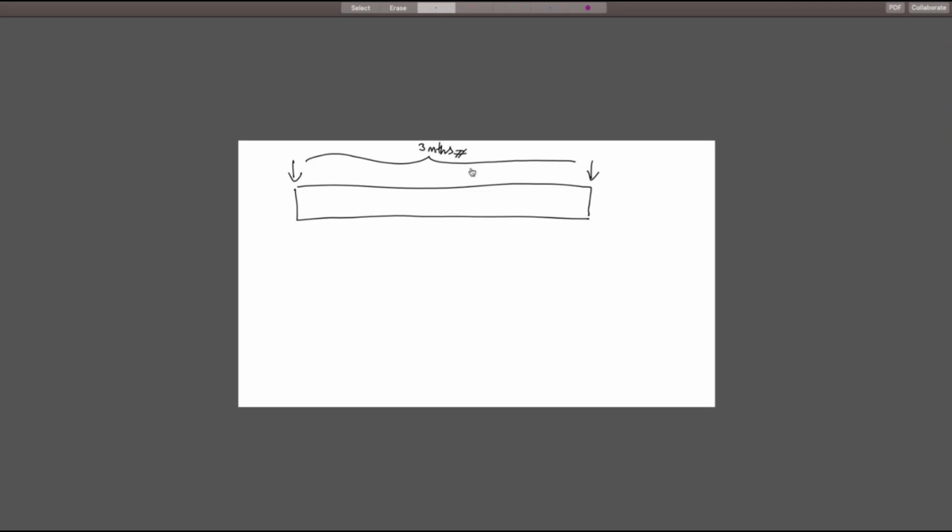So the idea is now breaking up this into manageable parts, right? So probably I could say this could be about 3 weeks or so. You know, I got my maths right. Okay, this hopefully ends up 2 months plus at the moment. 3, 6, 9, 12, 15. Yeah, that's about 3 months, maybe short of a week. So you're actually breaking up these large chunks into smaller parts, right?